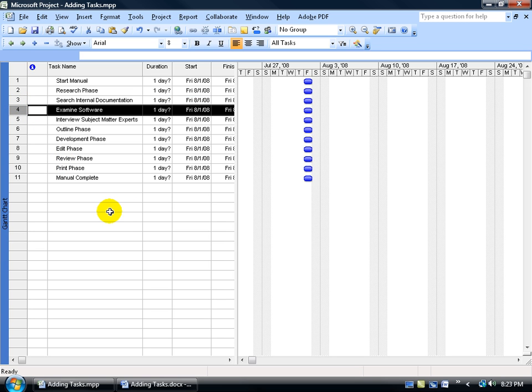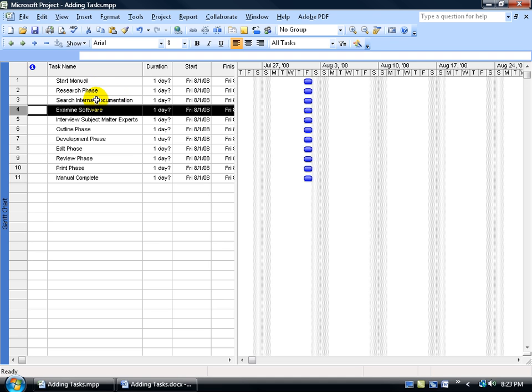So in summary, the only thing I want you to know here is how to add in your tasks and edit them if you make a mistake. Be sure to enter in your summary tasks and then below your summary tasks, insert and create those subtasks or the specific detailed tasks that make up that, in this case, research phase. Once I've completed all three tasks, then you can say that your summary research is completed.